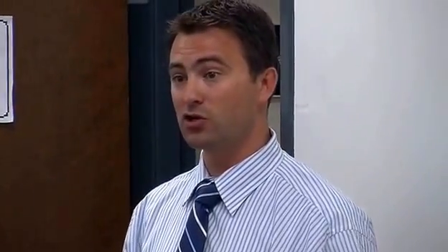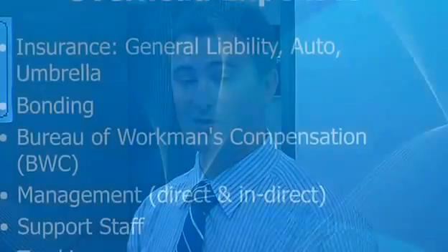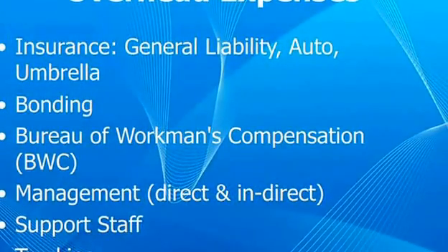So accounting for it in our bid, knowing that every hour I sell, I've got that covered. So at the end of the year, if I get a $100,000 bill because we had a good year, we did more volume than we expected, we collected that $100,000 over the year. It's not like it's a flat price. I need to collect $100,000 over the course of the year and it's done. No, it's variable. It moves with how much work we do. So in a good year, your insurance could be real high. And in a bad year, you might not pay much in insurance. You might even get a credit back.